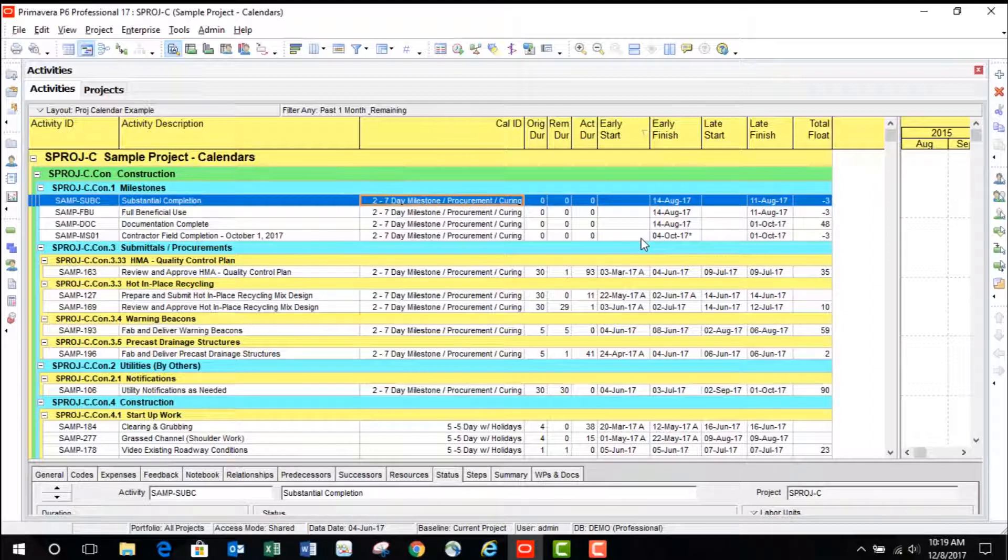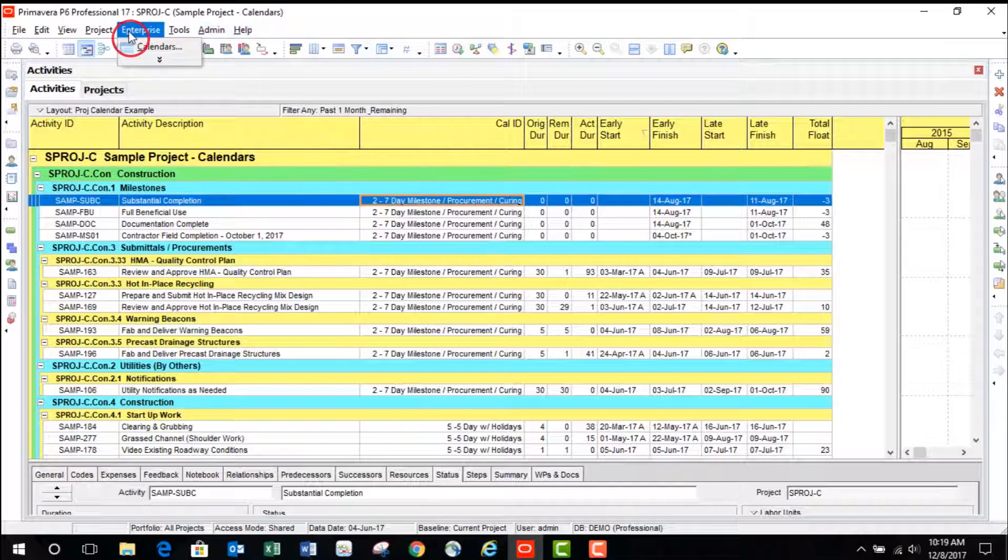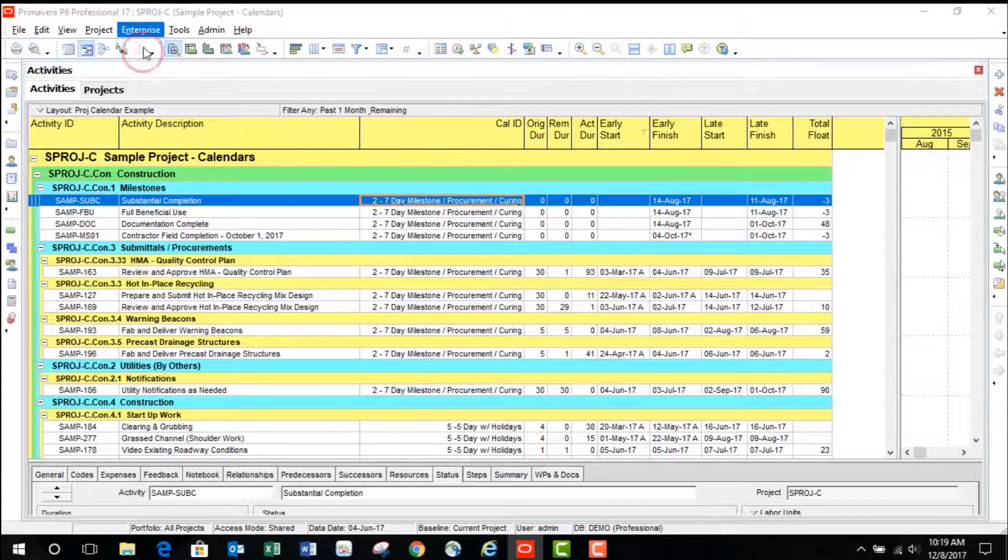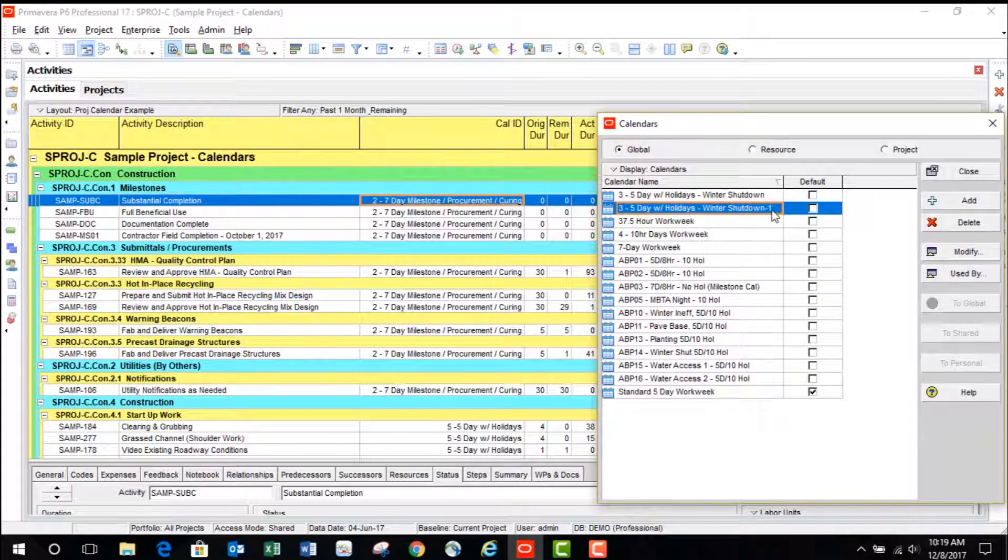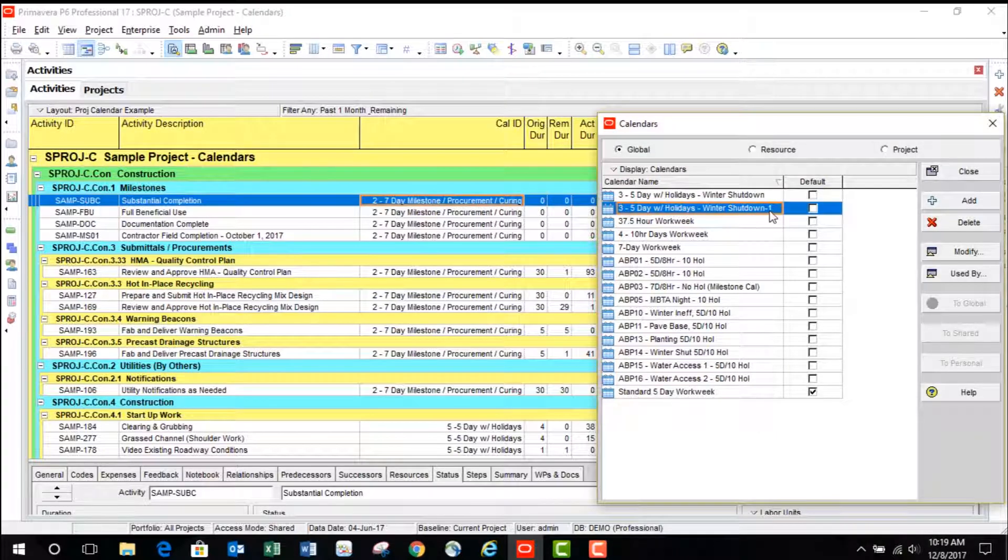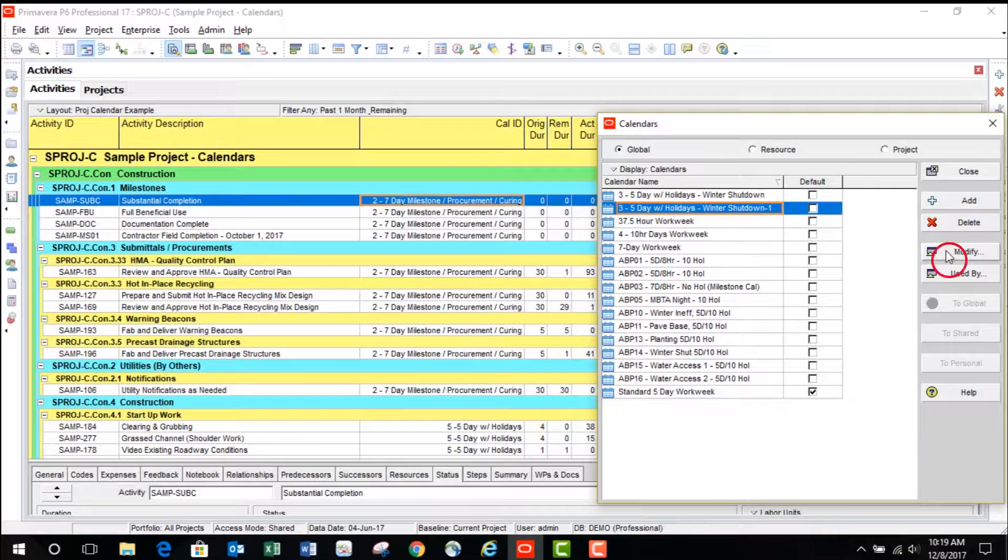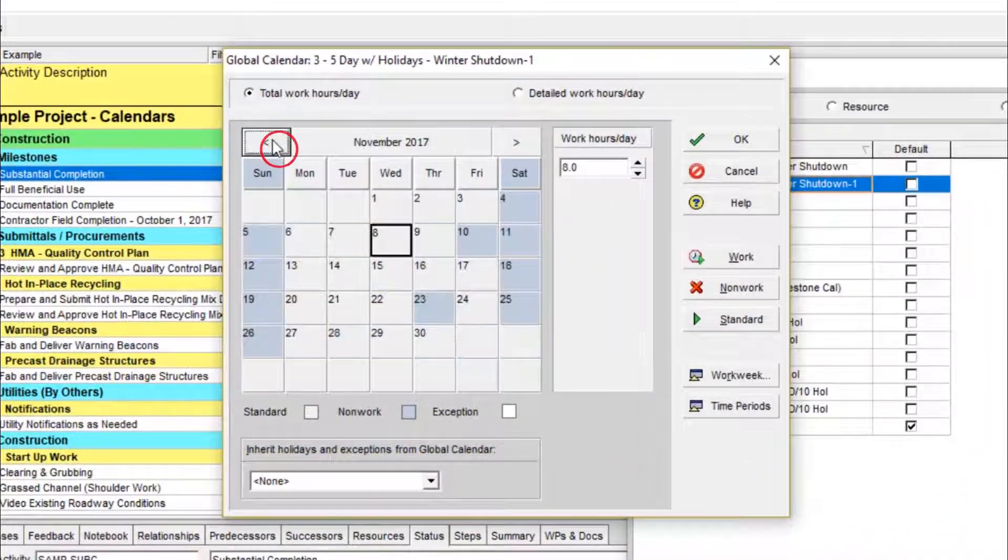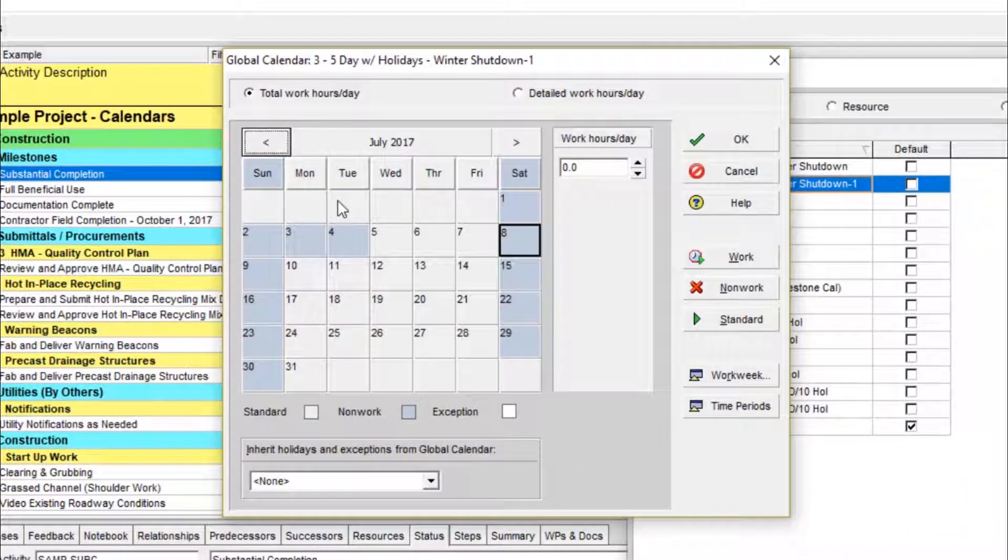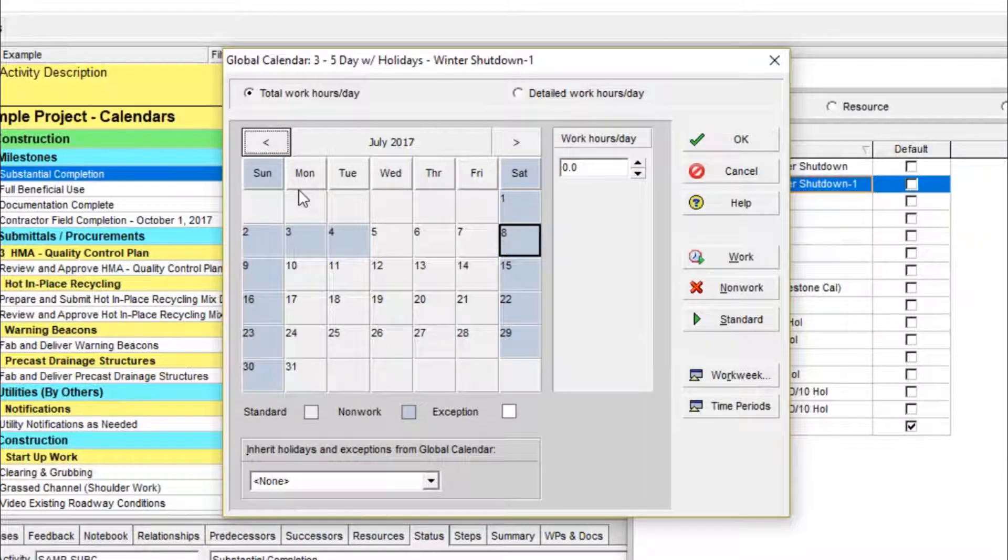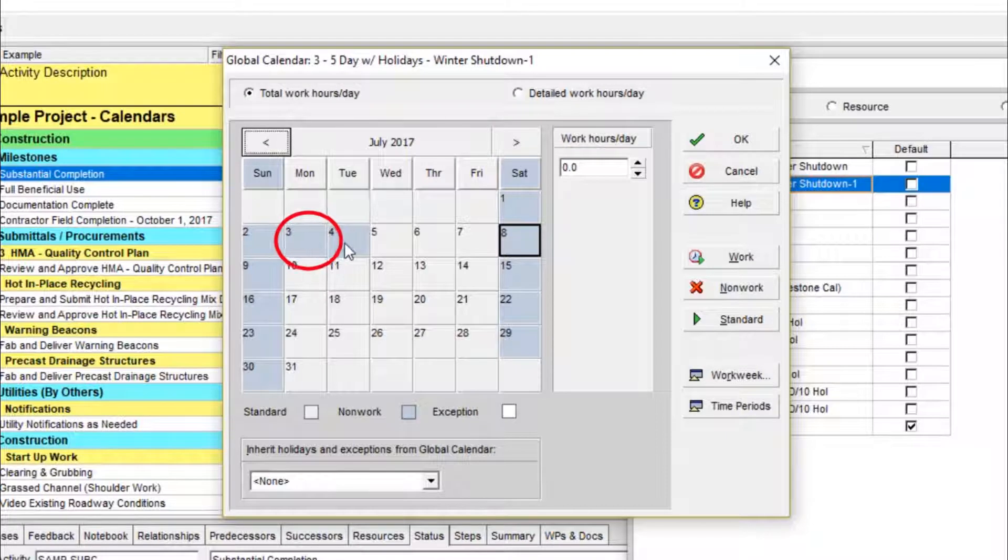I'll save us some of that trouble. Let's take a look at July under this calendar. You can see that it's made a copy of this global calendar, added a little dash one after it. Notice that in this example here, we'll say that the contractor providing the schedule is planning on Monday, July 3rd, being a non-working day.